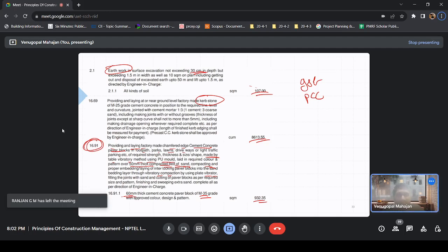If it is not clearly mentioned, I will say you bring one door to me. You are saying, okay, it will cost 5,000, and I am thinking that in 5,000 you will also fix it. Then after bringing it here, you say my work is done, my contract is fulfilled. If you want it fixed, you pay me more. Supplying and fixing has to be mentioned, sir. Yes, fixing has to be mentioned, and how you have to fix it, what other fixtures you have to include on the door.